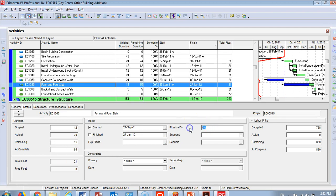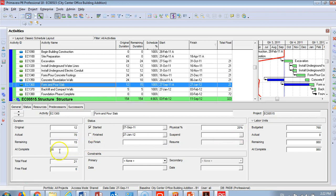The important thing is to add the remaining duration. I also forgot to add the percent complete — let's set it to 20%. So now I've added the actual start, the percent complete, and the remaining duration. If the activity is completed, mark the actual finish. If it's not complete, you enter the actual dates, the percentage, and the remaining duration. You can see the at-completion is 85 days, which means this activity is taking three to four times the original duration — resources are not performing well.